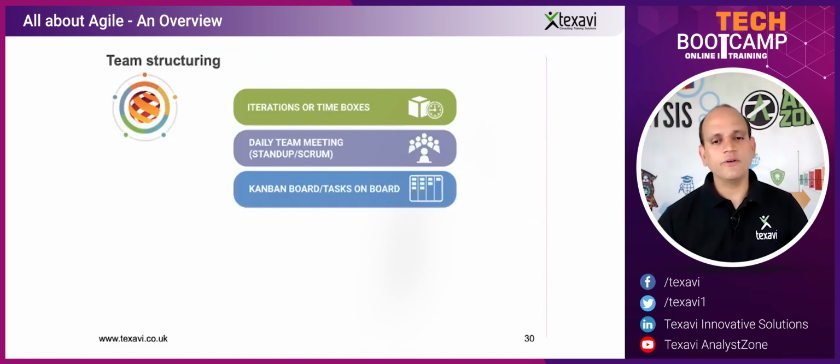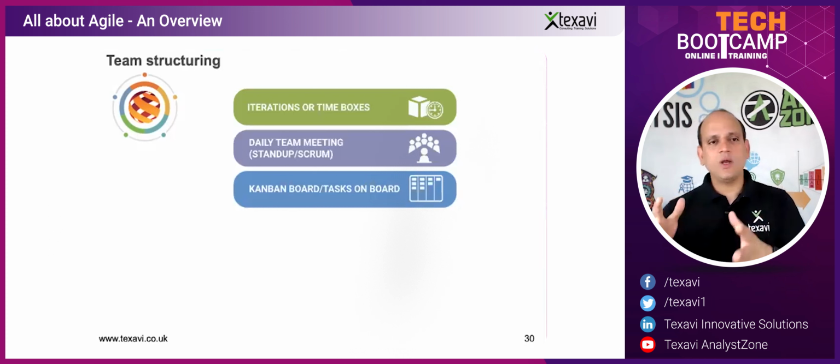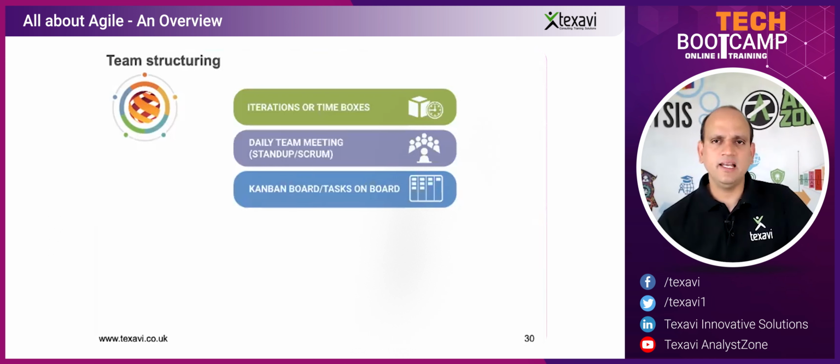And then we use a lot of Kanban boards. This is how we maintain the requirements in the Agile context. Again, we'll talk in very detail later. This is like a Kanban board. Here on this side, we can have a backlog, all the things to do. This could be things that are in progress, or these set of 2 items could be things that are ready for review, and this is done.